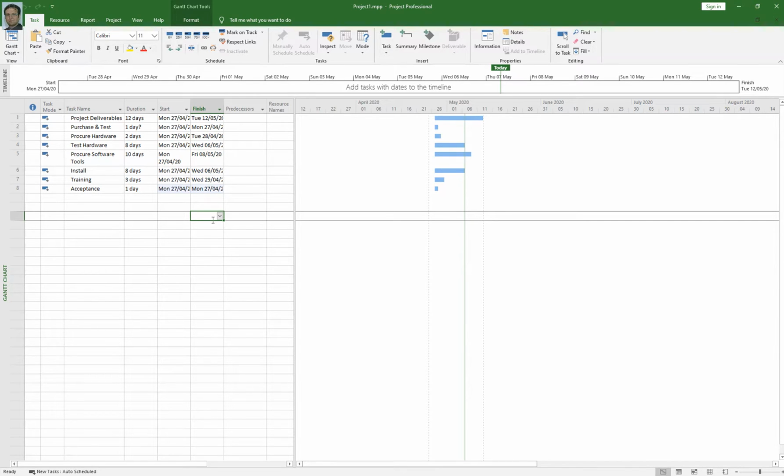Based on the project scope statement, we graphically explain our project in work breakdown structure. A work breakdown structure is a graphical representation of your project, and we take our work packages in WBS and we further decompose our work packages into activities level.